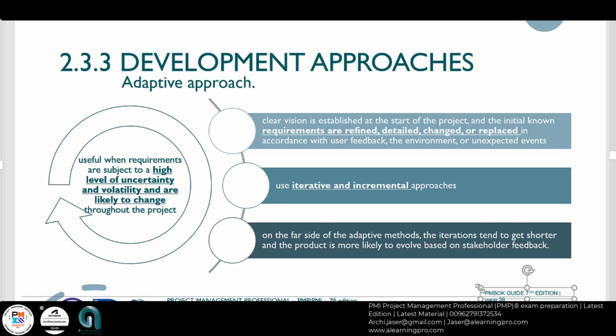Do you remember what the purpose of having the adaptive approach is, or the benefit of having the adaptive? You can adapt to the change that's happening, but the ultimate benefit of adaptive is that you're submitting incrementally. When you submit an increment, it's fully functional, usable, and can be released to the customers. Then you can get the return on investment on increments. You don't wait until the end of the project to start getting benefits. No, you can start getting them from early stages by submitting releases or increments.